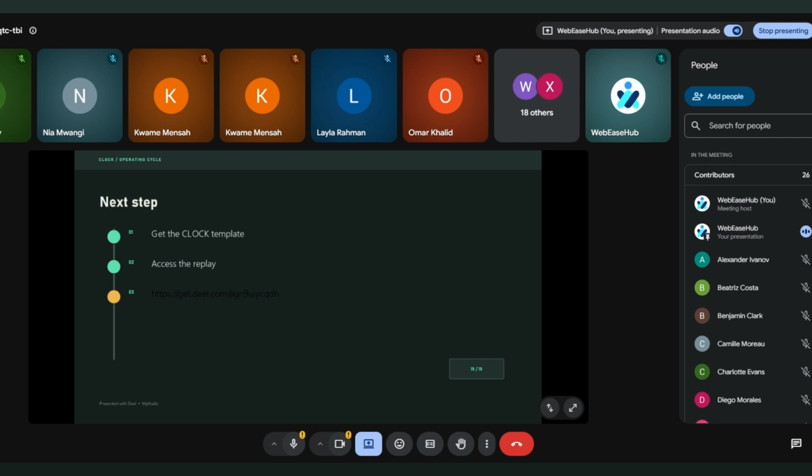Notice what this calendar doesn't try to do. It does not list every individual task in the organization. It identifies the control points where a delay, a decision, or an incomplete handoff could affect the cycle. For each row, BrightPath should also maintain the lead time rule: accountable owner, backup owner, communication audience, and link to the relevant operating checklist. That turns a simple calendar into an operating rhythm that people can actually follow.